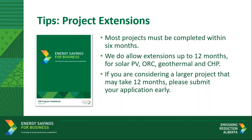As part of the pre-approval process, each project will receive an application summary that clearly states a submission deadline. Projects that fail to meet that deadline risk losing their funding. Pre-approval reservations are generally valid for up to six months from the date that the approval is granted. Large CHP, organic Rankine cycle, solar PV, and geothermal can take longer than that, so these project types may request timeline extensions at pre-approval, reviewed on a case-by-case basis. The longest funding reservation permitted within the program is 12 months. ESB is intended to be a short-term stimulus program, and some project types may be extended until June 30, 2022 at the latest. Your project must be fully constructed and the required post-project applications submitted by June 30, 2022. I will now pass it off to Patrick and Myron to take you through how to submit a post-project application and change request.